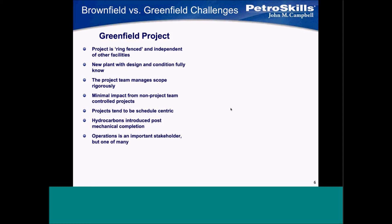I'll let you read the items there on greenfield project. The project is ring-fenced; new plant design with condition fully known because you're starting with a clean slate. The project team manages basically everything. Minimal impact from non-project team controlled projects. Projects are schedule-centric, meaning they're schedule-driven. And we only introduce hydrocarbons at the last minute at startup.